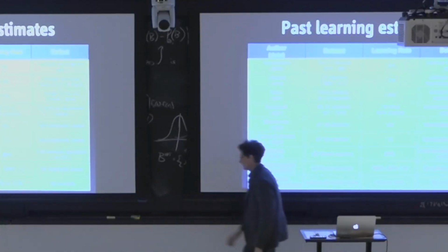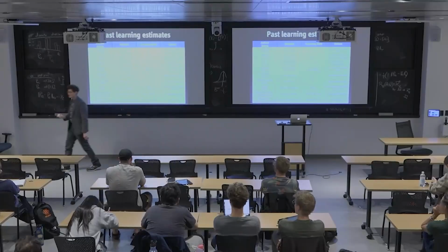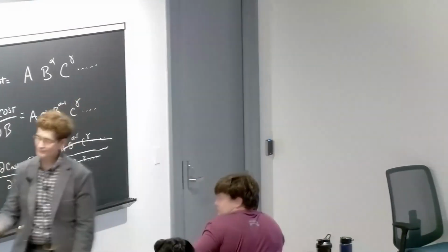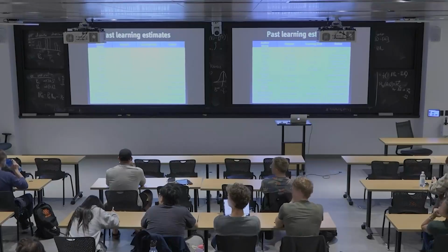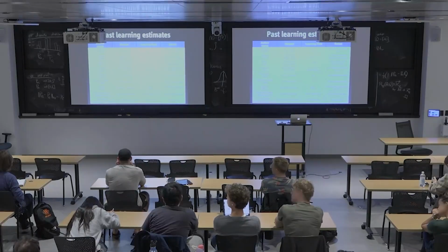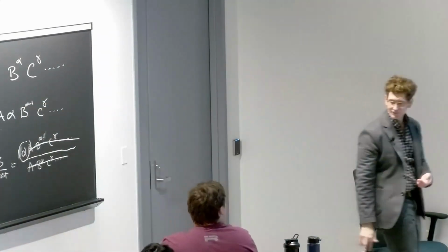So instead of a logarithmic decrease in costs, they have something that basically looks like this. And then the cost savings asymptotes to basically 0 instead of continuously going down, down, down. That does kind of make sense, because you're going to reach a minimal cost at some point.